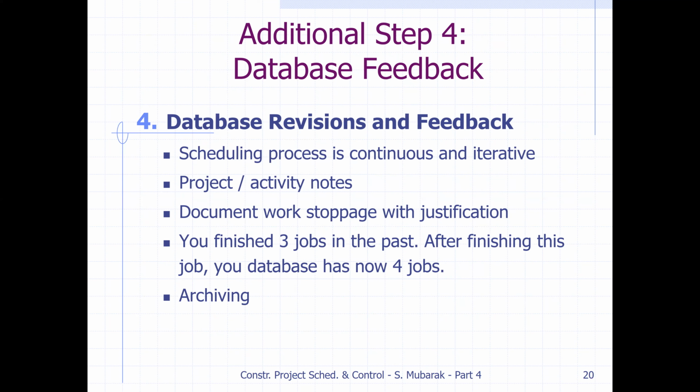So we can archive those previous schedules, and we can take help to understand things: what was the learning from the previous schedule, and what feedback we got from the site people and from the construction manager. Then we should keep the accessibility and confidentiality of the schedule, because it will be used for claim settlement or as proof.